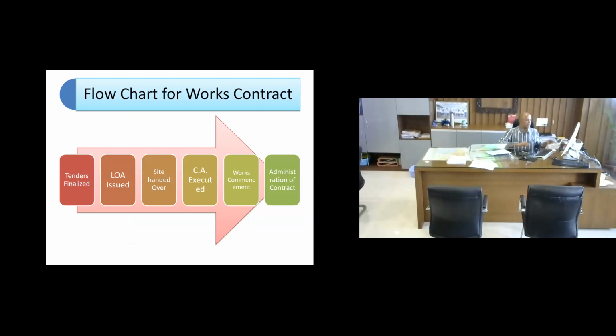Okay, so let's go ahead. Once tenders are finalized, you issue a letter of acceptance. Thereafter, the site should be handed over, and that should be on paper. Then you execute a contract agreement, then work is commenced. Then it starts administration of contract.